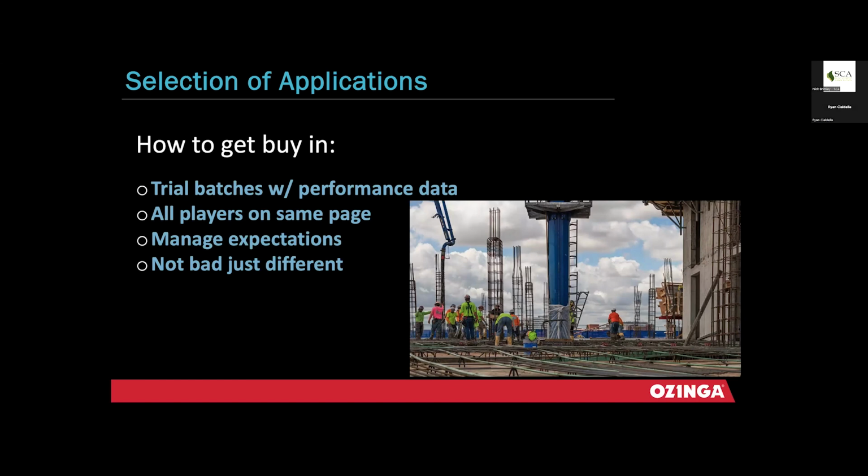And then you're dealing with low strength phone calls and coring or non-destructive testing, additional costs and project slowdown. So, I don't mean to sound like a broken record, but having more than normal conversations with all the players at hand needs to happen until this becomes the new norm. And as we continue to try to get to net zero, these mixes are going to become less and less forgiving when it comes to the testing criteria and how they're managing the cylinders and casting the specimens.